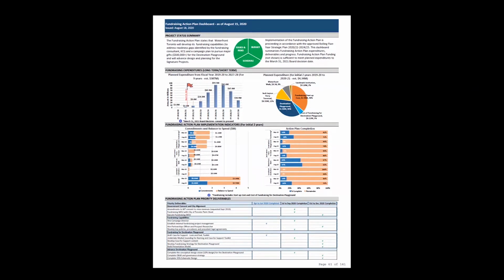Yes, hi, it's Chris Glashek, also involved in the fundraising. I also just wanted to note for the board that we do have in our back pocket what we're calling a plan B, which is if we aren't successful in raising money, we have a baseline landscape design for that area so that we won't have a big hole in our park. We just wouldn't have destination play. So we are trying to plan for both eventualities. Hopefully we're successful, but if not, we have a plan if we can't move ahead with it.